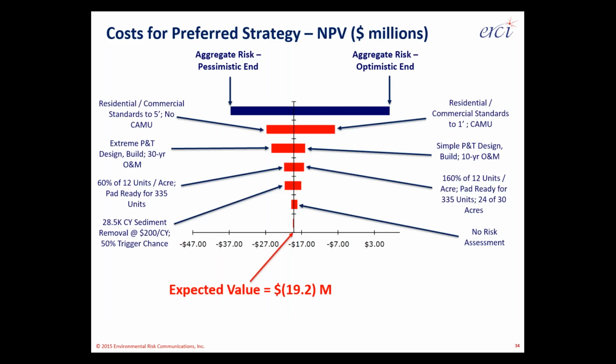One of the more common uses is to figure out where to spend time. I advocate to you that decision analysis helps you understand if you should spend time on the high cost items versus the high uncertainty items. Sometimes they're the same things, but sometimes that's a matter of definition, and you have to look at what items are going to display lots of uncertainty.